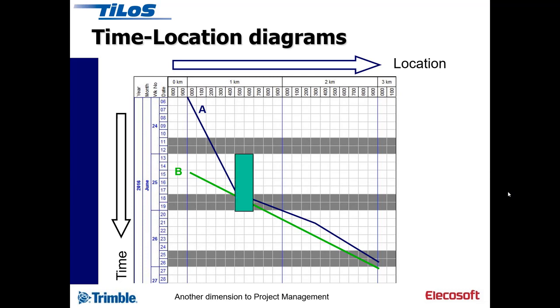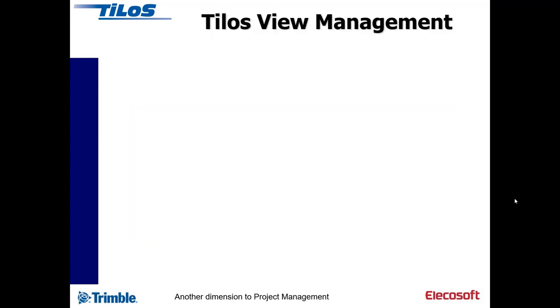But also you get environmental obstructions, you get things at a certain place that you've got to work around, such as bat nesting season in a particular location. And again, because that's a distance problem, you've got an elegant solution to that in TILOS. So time distance planning as a concept, aided by the presentation and the computational abilities of TILOS, is really second to none, and that's why it's been used over many years and is the serious market leader in this area.